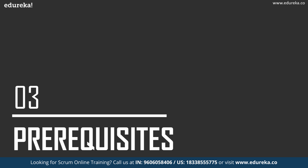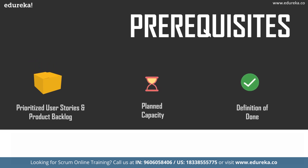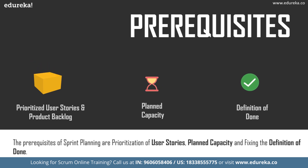There are certain prerequisites to hold effective sprint planning: prioritized user stories and product backlog, planned team capacity, and the definition of done. Your user stories and story points should be in a prioritized, well-groomed order so you know each item's priority before planning begins. For planned capacity, you assess how much each team member can work in a given time. For definition of done, every member must agree on when the product is considered ready — it is a complete checklist of criteria.